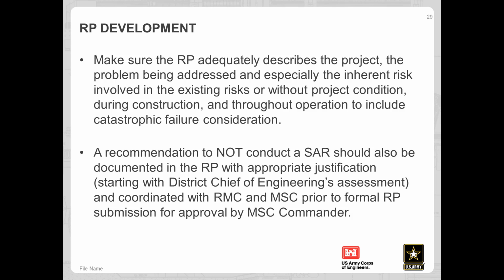And so that's why it's important for the review plan to adequately describe the project, what's being looked at in your study, or if it's a design, the elements that are going to present key risks. For planning studies, it's really helpful if you describe your without project condition, so that we can make a good determination and have justification if we're going to seek an IEPR exclusion.